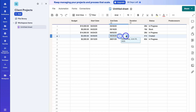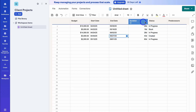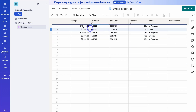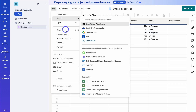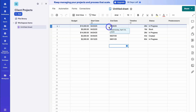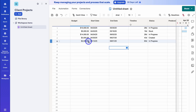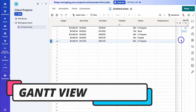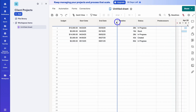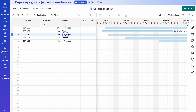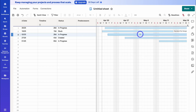Now if I change any of these dates, the duration will update automatically. For example, 41 days — let's change the end date to the 27th, and now the duration is 43 days. I'm going to rename this column 'Timeline'. Remember, when you've made any changes, navigate over to 'Save' to save your changes — you can also go to File and click Save. Now because we have a timeline with start and end dates, we can also navigate up to 'Grid View' and select 'Gantt View'. That adds a Gantt timeline on the right-hand side where we can visually see our projects.